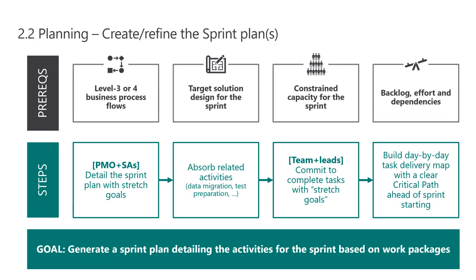Within the sprint plan, you are planning all the related activities as part of that sprint plan: the data migration activities, any test preparation activities, security activities, etc. So what you're not doing is handing off the data migration planning to a separate technical team that just goes off and does their own thing in a silo, right? This is planned simultaneously with those experts in the room.